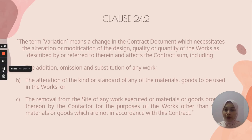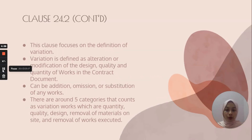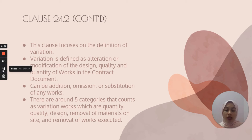Here is Clause 24.2. This clause focuses on the definition of Variation. Variation is defined as alterations or modification of the design, quality and quantity of the works in the contract document. It can be additions, omission or substitution of any works. There are around five categories that count as variation of works: quantity, quality, design, removal of materials on the sites, and removal of the works executed.